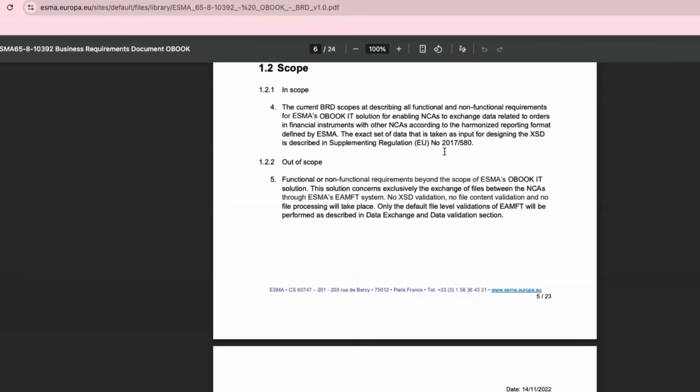Don't defend your team by saying, oh, this was something you guys have to give. Don't do that. You have to be very patient and then ask them, can you list down what the expectation or what the changes are, and can you send me an email? So either you record the call for your proof, or you send an email. Just politely ask them to send an email, because there needs to be documentation that business requested these changes.